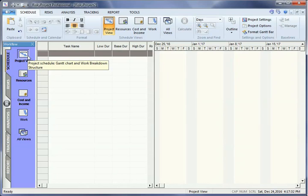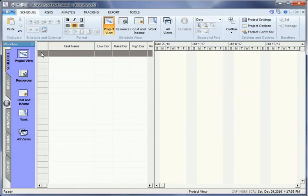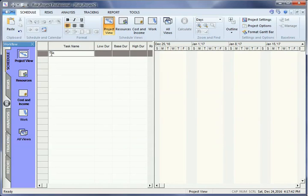To define a schedule, we first need to add a task. To add a task, left click in the first row and type in a task name. By default, the task has a duration of 5 days.